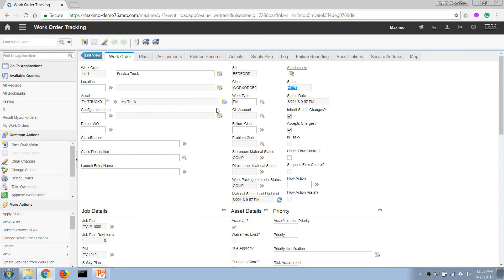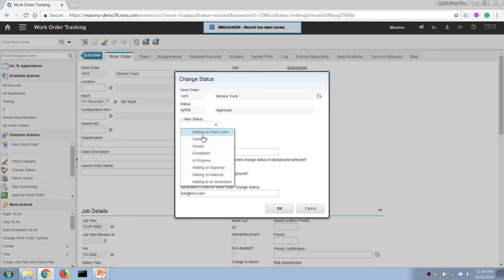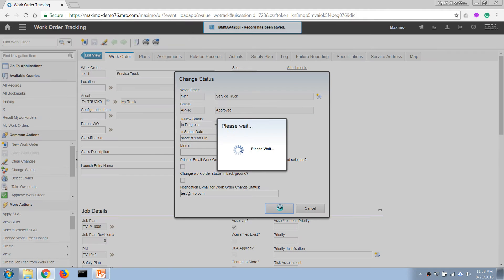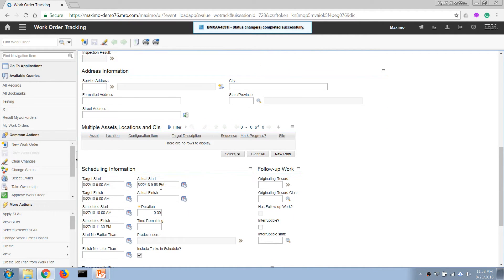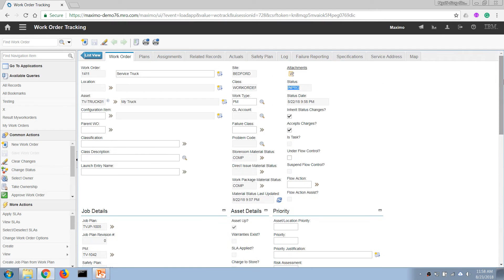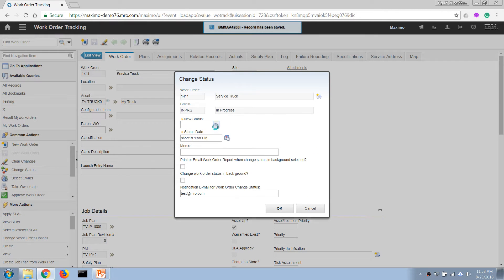The next step in the general work order process is to execute it, so we change the status to 'In Progress'. Once we change the status to In Progress, Maximo will automatically calculate and fill in the actual start date and time. Once the work is completed, we can then change the work order status to 'Complete'.